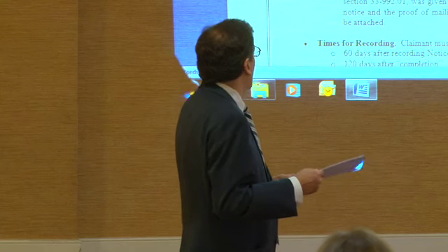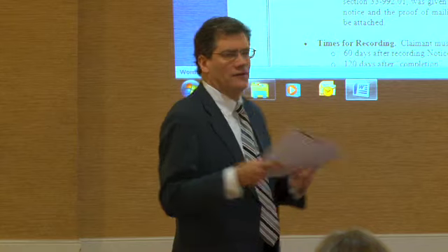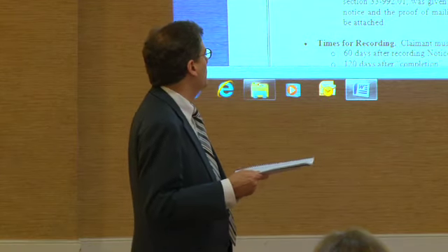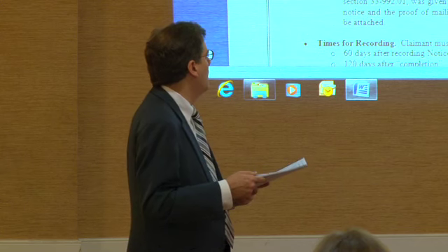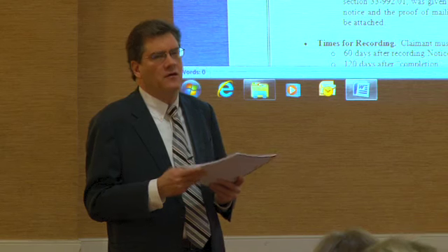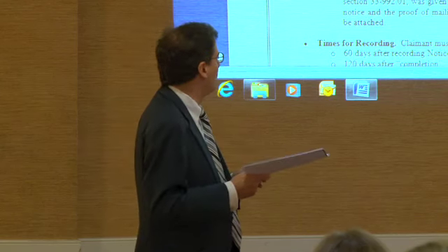All right? A statement of the lienor's demand after deducting just credits and offsets. How much you are owed. A statement of the date of completion of the building, structure, improvement, or of any alteration or repair. If you know when it was completed, you put it down. If you're not sure, just say, believe it's not complete. But in best faith, you do that.